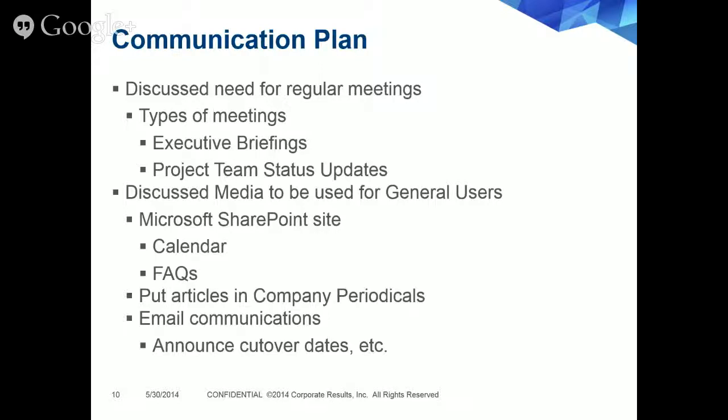We also recommend using the calendar within Microsoft Outlook. So it could be a group calendar, and you can put your WBS structure on that calendar. So when an individual goes into the calendar for the group, they'll be able to see, according to the WBS, where the project is at and what their expectations are coming up for due dates, and when their time is going to be needed. So it's a good way for everyone to keep on track and see where the progress is at, or see where the possible delays are, and adjust their schedules accordingly.